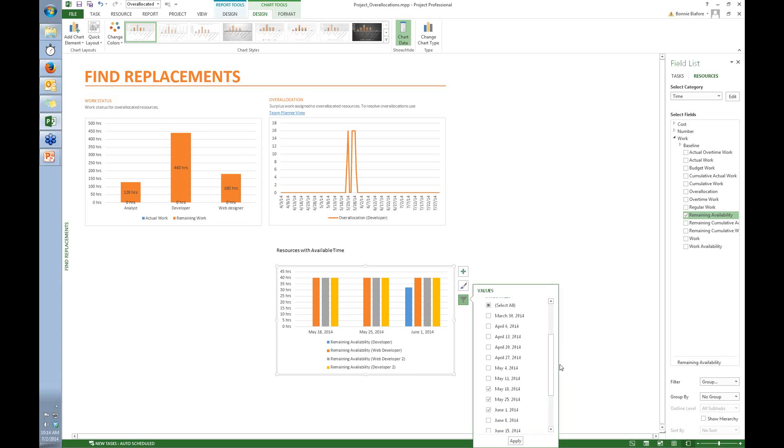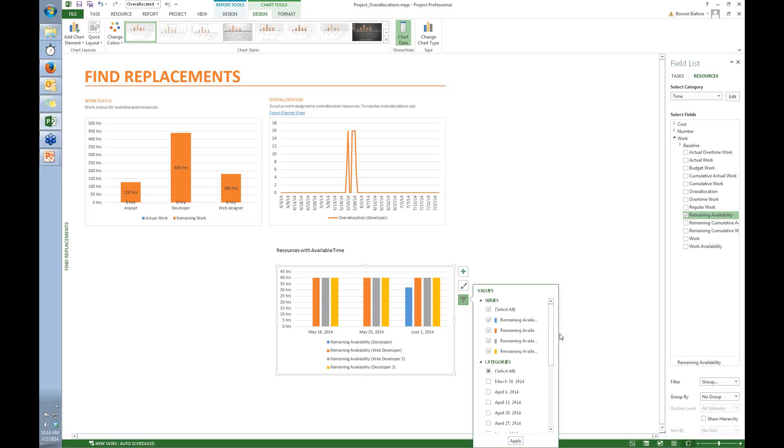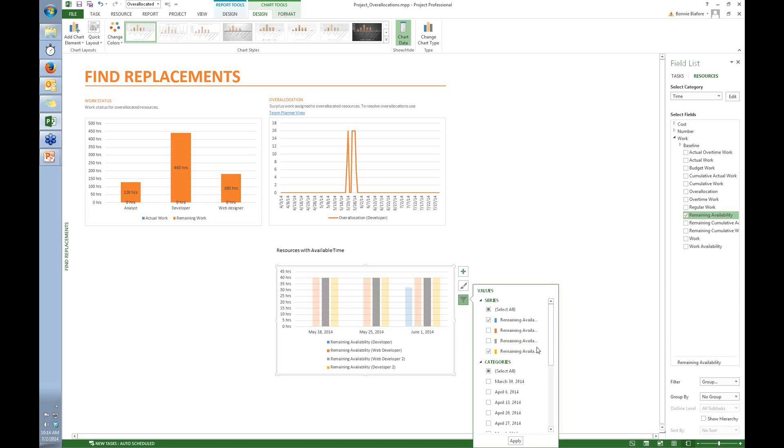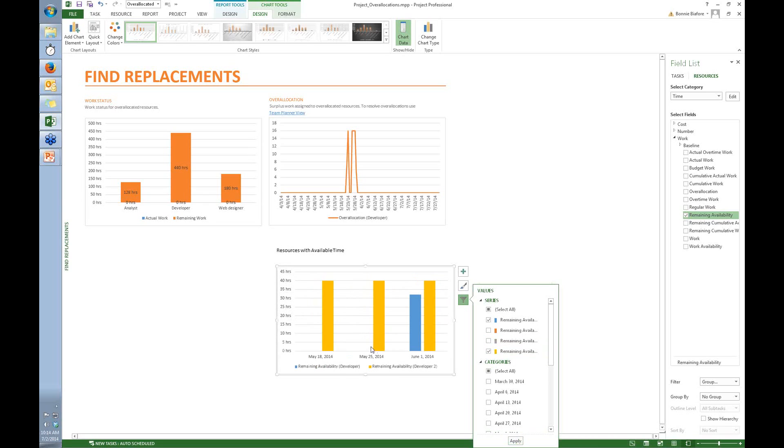And now you can see there are the weeks. You can see the developer and the web developer. And it's like, oh wait a second. I don't want the web developer. I really need somebody who knows how to do regular coding. So I'm going to turn off the web developer and the other web developer. And now you see, I've got the regular developer and I've got developer 2. And conveniently, developer 2 is available for that assignment. So now I know who I can assign it to.